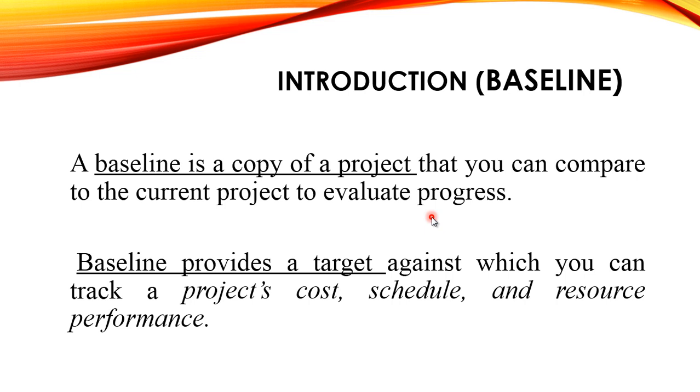In the durations, one activity may prolong to 2 days or 3 days, but when you planned the project, the original may have been 1 day or 2 days. So you make a copy of a project at the start, so that you can compare the progress of your current project with the saved copy. That's why this saved copy is called a baseline.